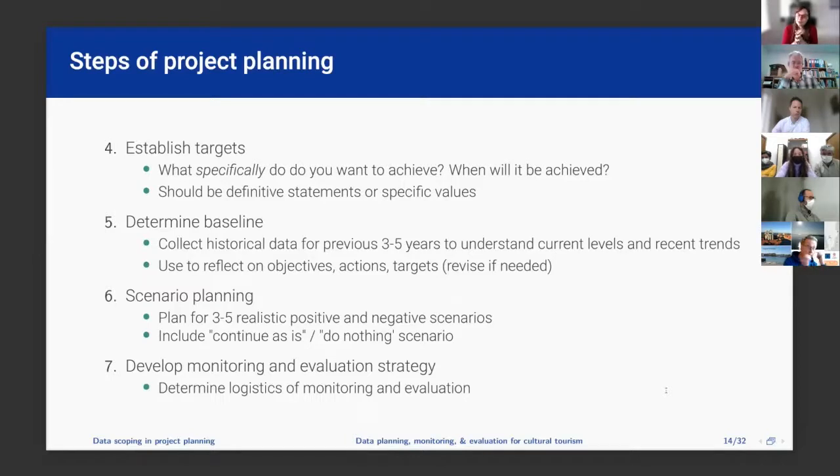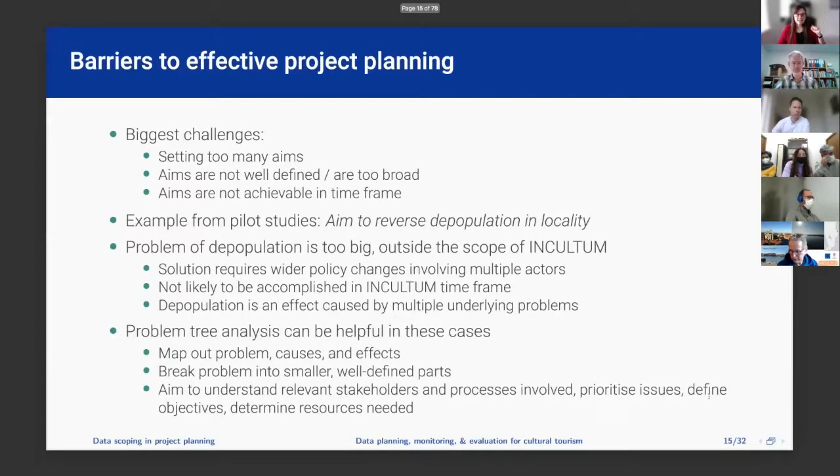The last is to develop your monitoring and evaluation strategy. This is a written document that outlines the logistics of how you're going to do the day-to-day monitoring of your progress, and also when you want to do an evaluation, how you're going to do that evaluation, and how you're going to disseminate it. So getting into the data side of things, first we need to think about the barriers.